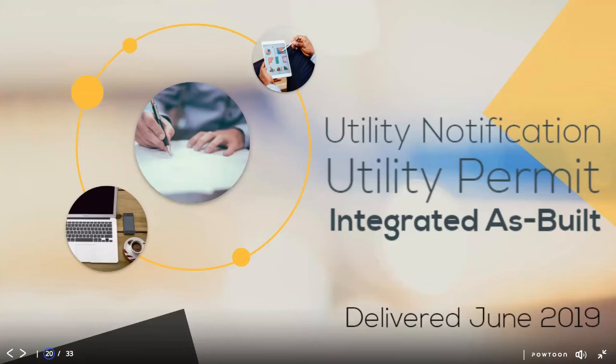So we started the project in September of 2018, and we had the first release open for testing in June of 2019. Starting from our current workflow, the team focused on guiding the external users step by step to reduce the mistakes and phone calls from them on how-tos. The design and development methodology was very agile. We received our first prototype in December of 2018, just 3 months after the kickoff, for notification permits, and had a totally functioning version by March of 2019.